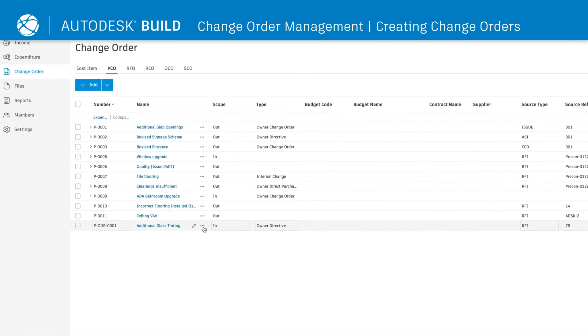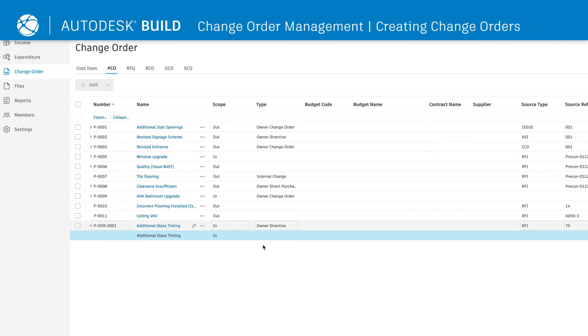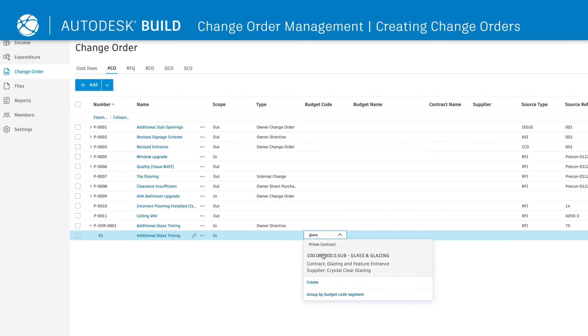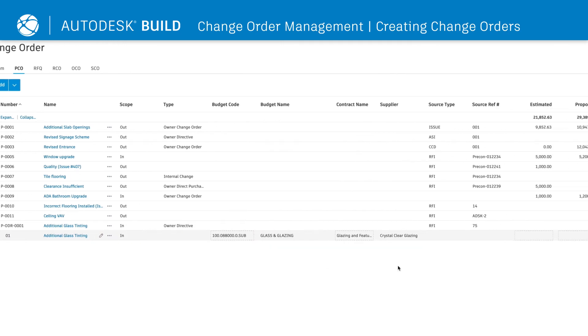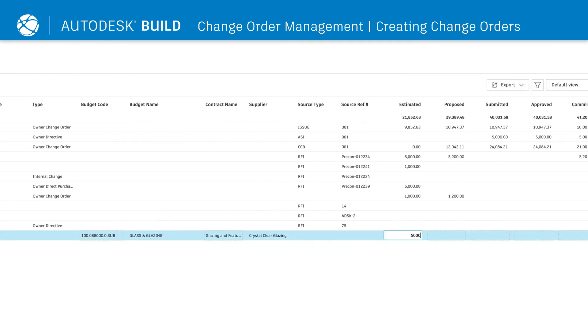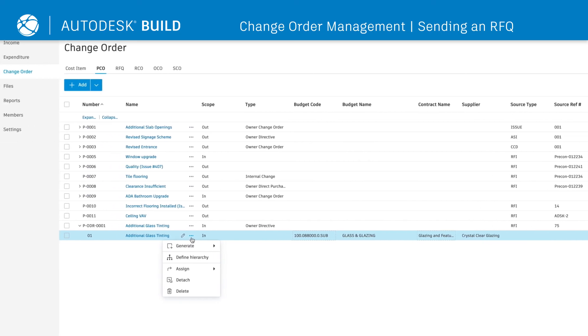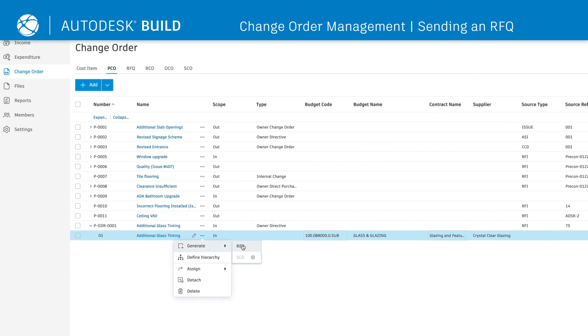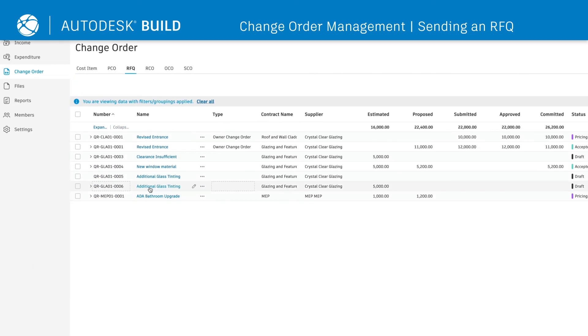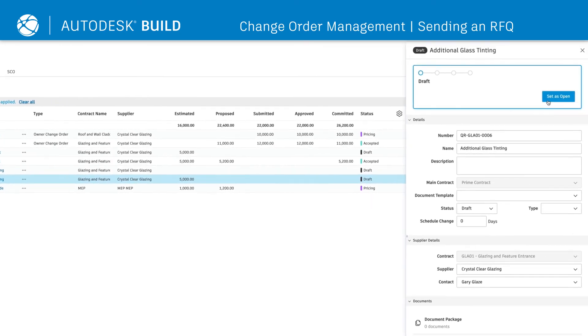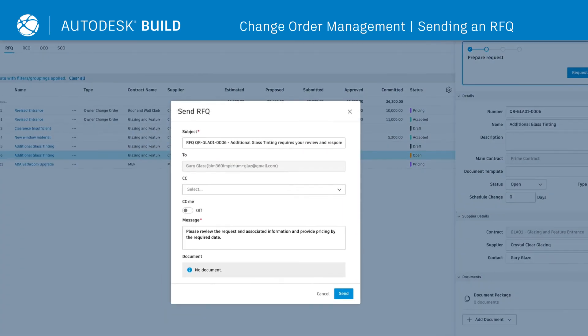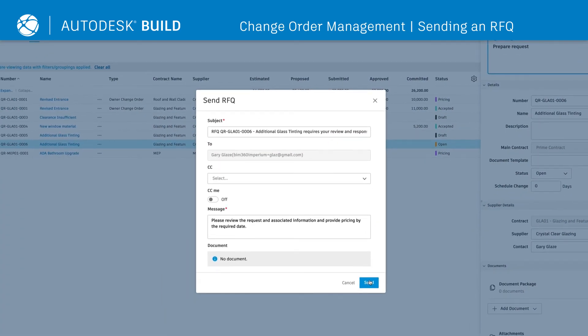From the PCO tab, simply add in cost items, link to the budget, and input an estimated amount. To verify the cost, teams can easily send a request for quotation to a single supplier or multiple suppliers.